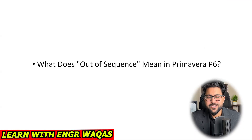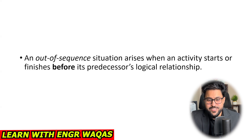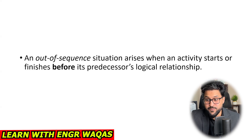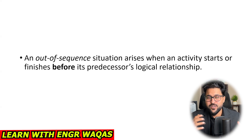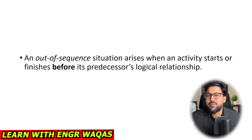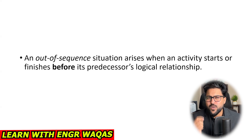What does 'out of sequence activities' mean in Primavera P6? Out of sequence means this situation arises when an activity starts or finishes before its predecessor's logical relationship. My upcoming slides are compiled to make this concept very simplified for you to understand, but before that I would revise one more concept.